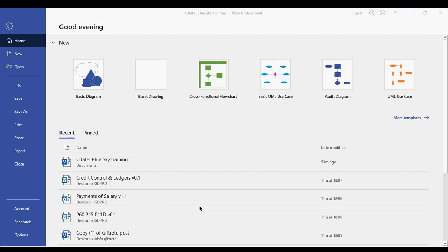In traditional waterfall, you may need to write all the requirements before you get that sign off. But in agile, they may say, you just need to write the requirement for the home page, or for login. It's something they want to release within 2 weeks or within 4 weeks, so you just write that requirement based on what they want to develop.